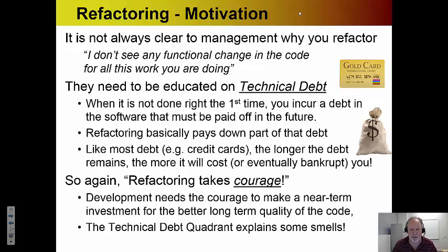Hopefully, you can negotiate a term, maybe a stabilization sprint. Maybe you can, well, like I mentioned before, I negotiated with my management a 10% recurring cost on every developer to go in and improve the current code quality. We had acquired a product through a merger with another company, and the code that company gave us actually was terrible. And so we were trying to incrementally improve it while still building new releases on it. Very tricky business. So in any event, your organization needs to understand the concept of technical debt and needs to have a strategy where they understand how they're going to pay it down or even how to avoid it.